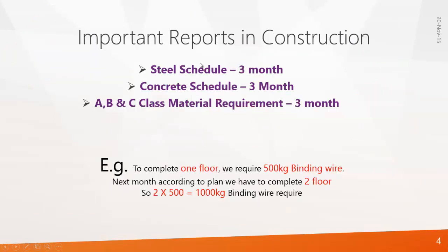And when you work in construction, you must know these reports that you have to prepare: a steel schedule for 3 months, a concrete schedule for 3 months. Also, every month you have to prepare the A, B and C class material requirement for the next 3 months. So here I have given an example of how to calculate the materials in a project.